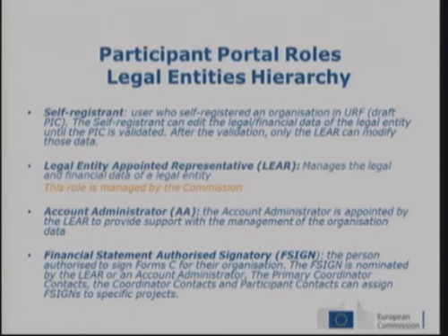As you were able to see when you were negotiating, here you have part A, which is the part from the organizations, and you can also have the work plan table: the work packages, deliverables, milestones. And then the narrative part B, you can also upload it there, maximum 20 megabytes. So, as you also saw when you were negotiating, for the description of work you have structured data that you can encode in NEF, and the narrative part that you can upload as a PDF.